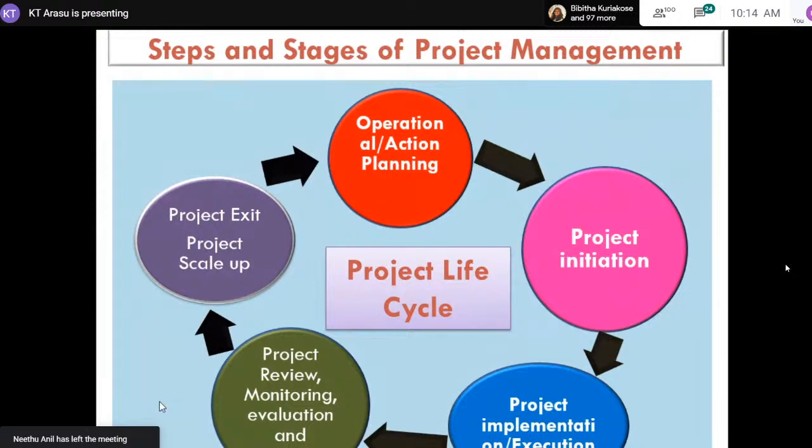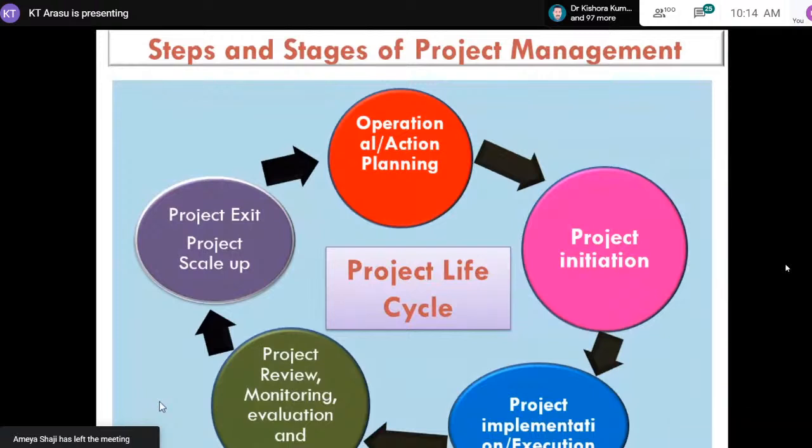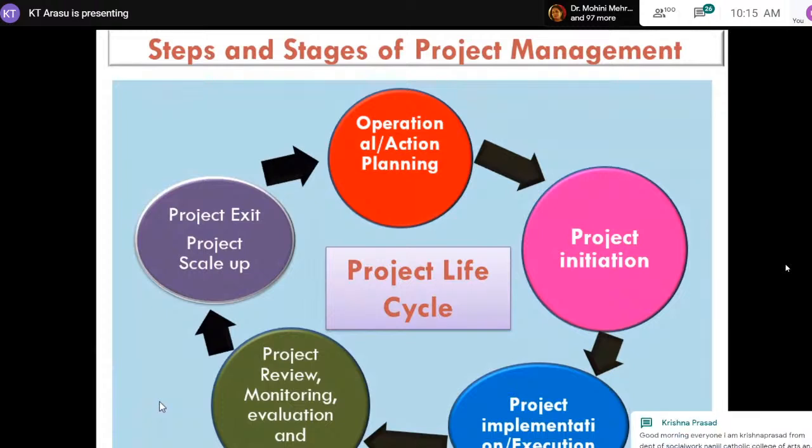That's why you have to be serious. We all the time correlate and relate with your budget. Please remember this. So this is one part of it. In a similar way, you have 4-5 components of a project. Break it into different units of cost, because cost is part of different units. Then break it into different time slots. For example, in a month you have to do this, in the quarter you have to do this. All these things, slot them out in an Excel sheet, and that becomes the operational plan.